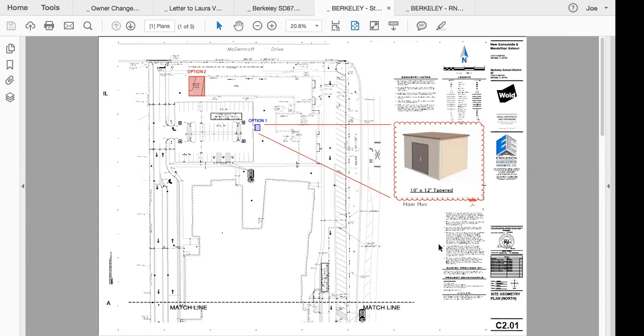At the Sunnyside MacArthur site, we poured a concrete pad just at the end of your maintenance bays here that was intended to set a storage building similar to what you see here. We did not have the storage building included in the bid. We had the concrete pad to support it. So we started looking at what solution would work at both sites. This is basically a prefabricated storage unit structure that is shipped here on a truck and then set in place. It would give Dale and his team the adequate storage, and would be one at each site.